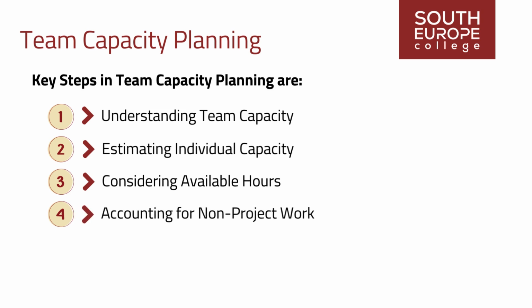4. Accounting for non-project work. Team members may have other responsibilities outside of the project, such as meetings, training sessions, or support tasks. It's essential to factor in these non-project activities when estimating team capacity to avoid overloading team members.